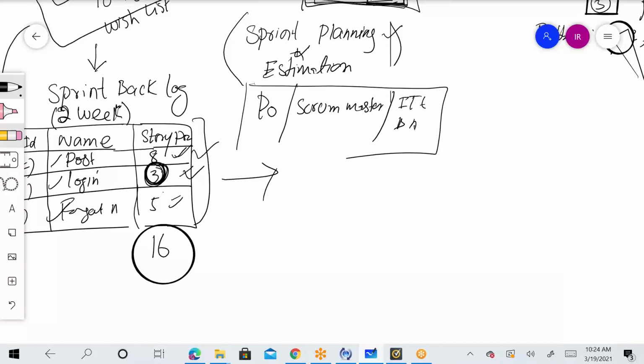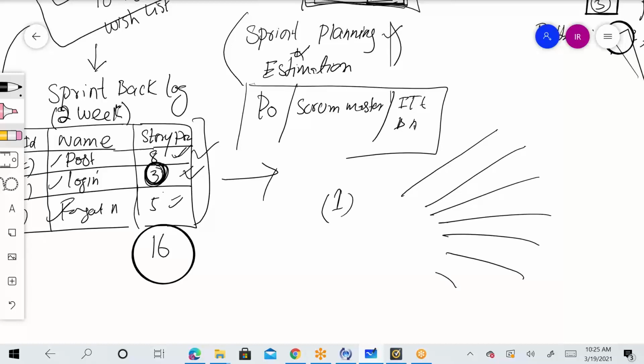In the first sprint, development teams usually have done similar kind of work before as well. So based on that effort, they can decide how many story points the story needs. And then they can always compare next time. So let's suppose they will take the smallest story point first, number 1, and they will try to locate any user story which can be the same. So they can assign the same user story points.